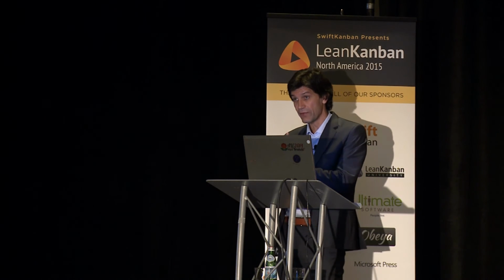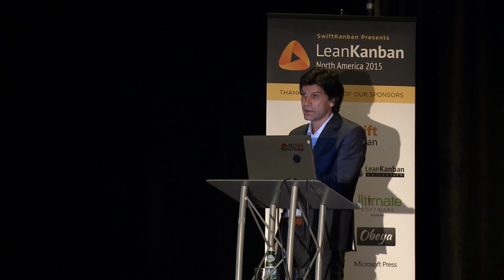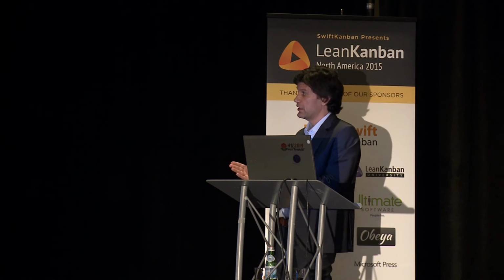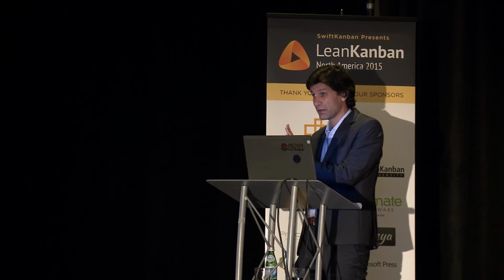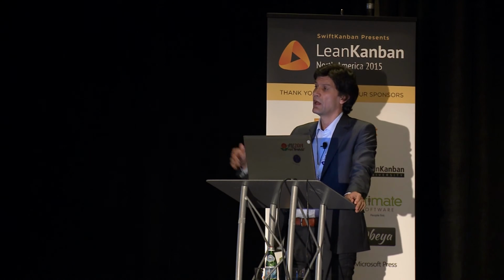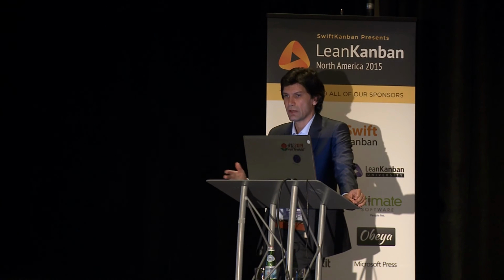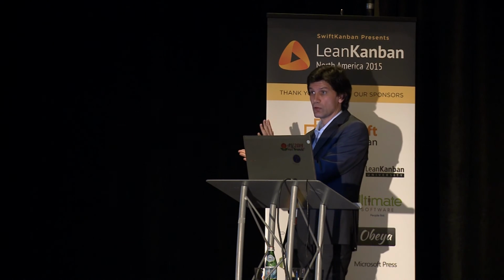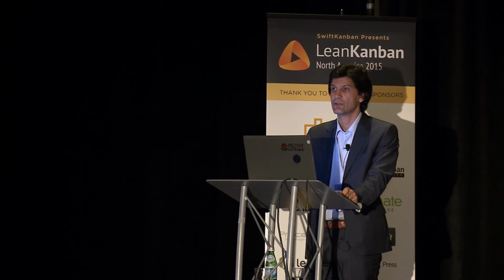And then to see if during the project, your team consistently applied the technique they use for analysis and splitting down stories, right? Because if they don't, based on this statistic that we have, there will be a very weak correlation between your estimate and actuals, which means that people could have been assigning story points at random, without any kind of analysis. So it's better to always compare the estimates with the actuals. Yeah. Other questions? Yes.